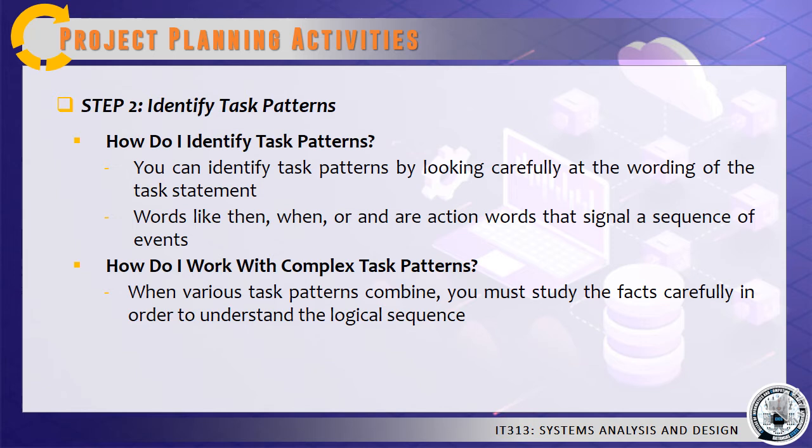This describes multiple successor tasks that can both start as soon as task 2 is finished. Another example is "when tasks 5 and 6 are done, start task 7." This indicates that task 7 is a multiple predecessor task because it cannot start until 2 or more previous tasks are all completed.